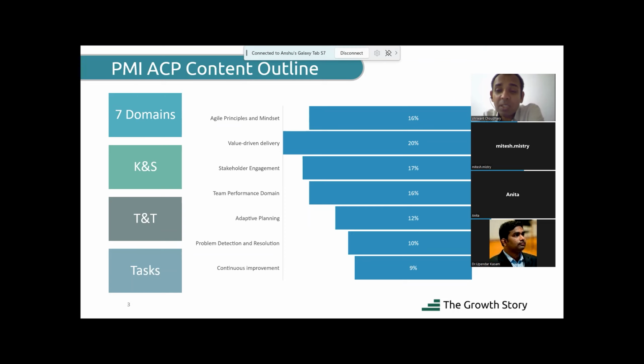This is called last responsible moment planning. Sprint planning is a typical example of last responsible moment planning, when we are very sure that these are the user stories which we need to do in the iteration. Then we break down those user stories into tasks, and we delegate those tasks to different people. We plan these tasks, and sometimes estimate the tasks again to recheck whether the total of those task estimates is equal to the estimates of the user stories or not. All these things we do in iteration planning or sprint planning.